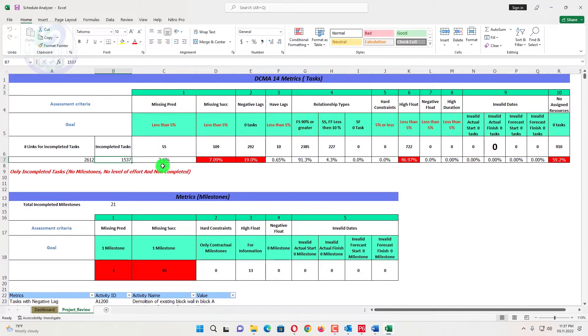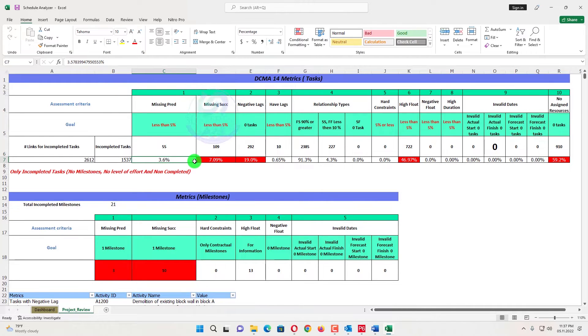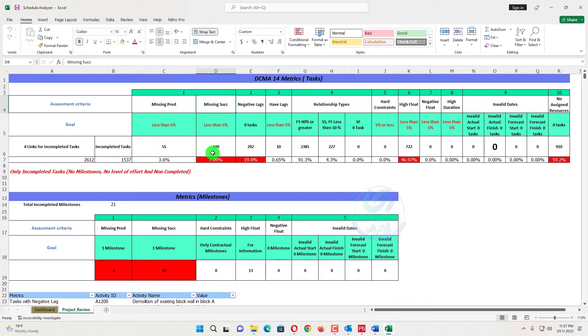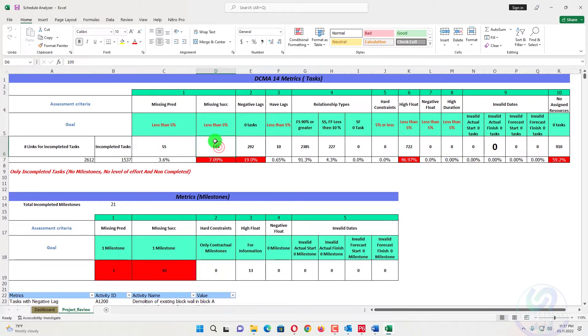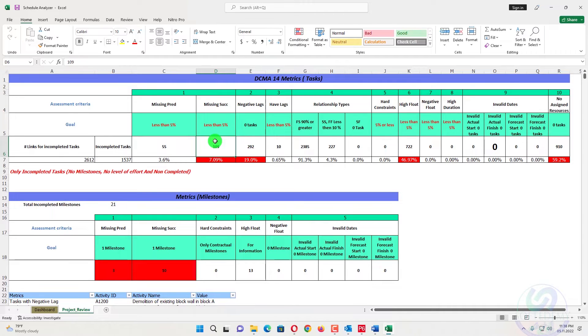Now we will go for the missing predecessor. So the missing predecessor should be less than 5% of total number of activities. So the total number of activities are 1,537 and 55 activities are there. So it should be 3.6%. So it's under 5%. And missing successor, the missing successor activities are 109. That's more than 5%, 7.09%. That's not acceptable. We can reduce that one. Because on task dependent, if you have more missing predecessor and successor, there should be open ended issues in each activity. If you have a missing predecessor, missing successor, also your critical path breaks there.